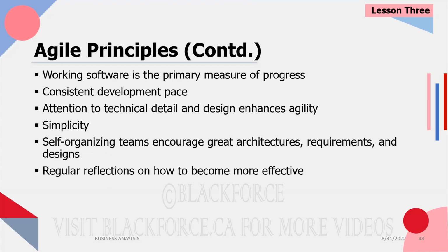Agile has a consistent development phase. Every sprint, we have a set of stories we're developing. In sprint 1, we develop these 5 user stories, then we push it to the testers. Now the developers are free. They take another 5 user stories, they're developing it, while the testers are testing the initial 5 user stories, okay? So there is that consistent development phase. You can almost tell what's going to happen because everything is planned, okay?